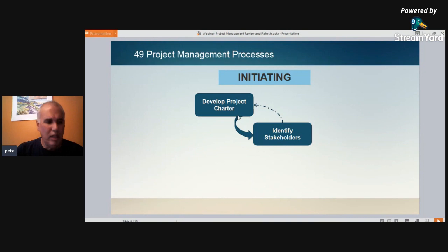This isn't the planning. We're not going into too much detail, and that's a common misunderstanding and actually a mistake for a lot of professional project managers, that they spend too much time getting into too much detail in the project charter. You really want this to be very quick, high level, show objectives, so you can move on to detailed planning and involve more people. Right? Get the project authorized. Your project charter is going to authorize your project. That's what makes it real.